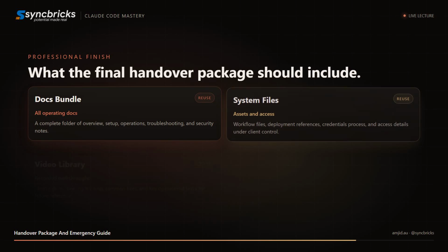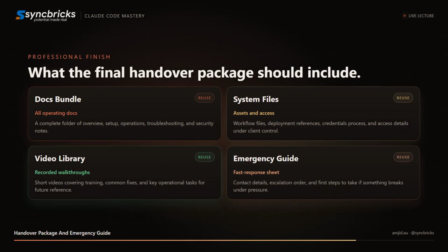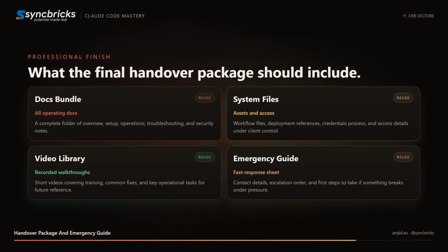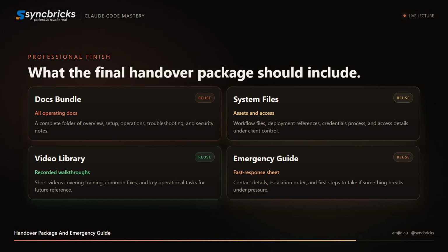There are also additional practices that improve the handover experience. Provide a complete handover package that includes documentation, system files, and access details. Create a library of recorded videos for training and troubleshooting. Include a simple emergency guide with contact details and steps to follow in case of issues. These small details create a professional impression and improve client satisfaction.